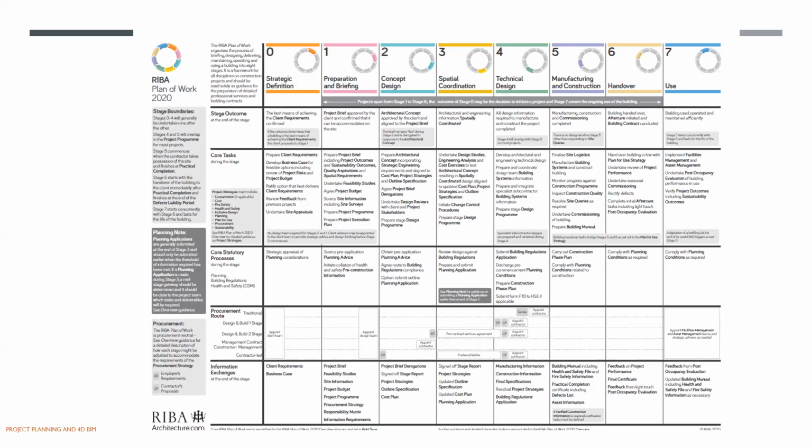Earlier I told you that any project starts with the requirement of the employer, that means from the employer's brief. So initially when we go to a project, the employer comes and discusses and gives his requirement, which is discussed in stage 0. He gives his brief and discusses it with his team, especially the consultant team, and allocates and discusses his budget and requirement. Based on that, the architect prepares sketch drawings and his intentions. And once he has identified the concept within his budget limit, he can move to the next stage.